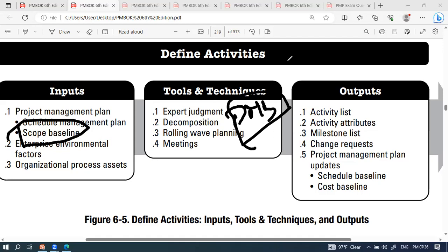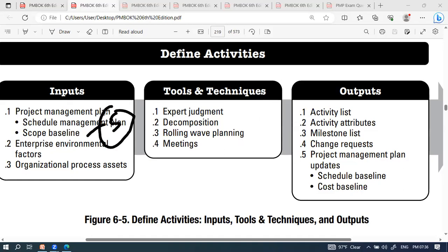Now, what goes into the scope baseline? We have to integrate 5 documents. The first one is your approved scope statement, right? The second one is your graphical illustration, the WBS, a hierarchical structure where you break the entire project down and show it in the form of graphics. Then to support each WBS component or work package, the technical information goes into a document called the WBS dictionary, right?